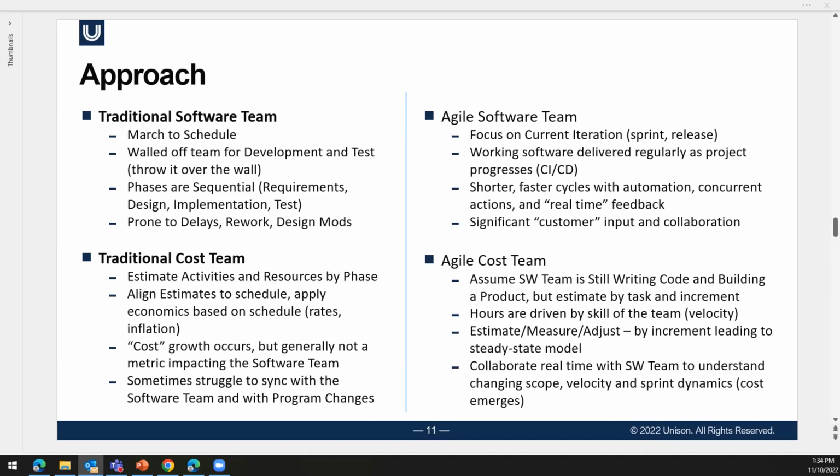All right, so let's bring it over. How does the Scrum team adjust the velocity when the sprint hour capacity hours are available? So it varies by the number of available calendar days, varies by holidays. And like I say, it becomes a moving data exercise. I keep going back to state theory because that's what state theory is. It's not quite like a 3-period moving average. It's more like gather what you know and leap to the next state. And if you're wrong, gather what you know and leap to the next one.